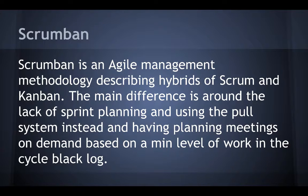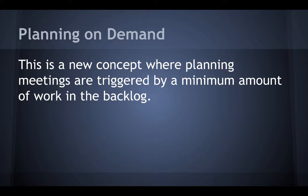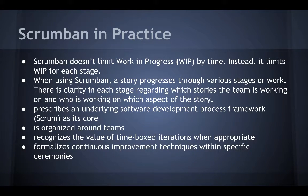I won't go too deep into the new methodology, but I want to give you some highlights and pitfalls. The core concept of Scrumban is that planning meetings are on demand — triggered by a minimum amount of work in the backlog versus by the end of a sprint. In practice, Scrumban doesn't limit work in progress by time; instead, it limits it by which stage it's in. A story proceeds through various clearly defined stages of work. It's Scrum at the core — still organized around teams — but the central thing is it recognizes the value of time-boxed iterations and formalizes a continual improvement technique with specific ceremonies.